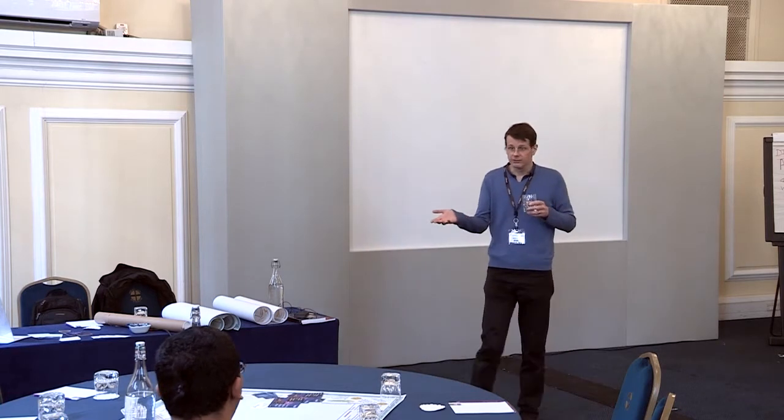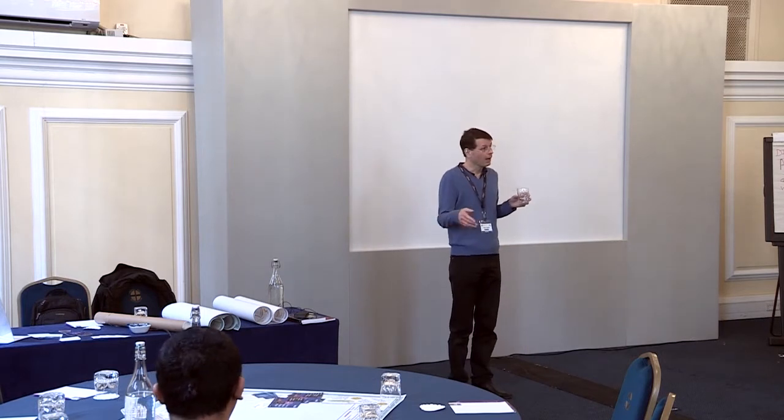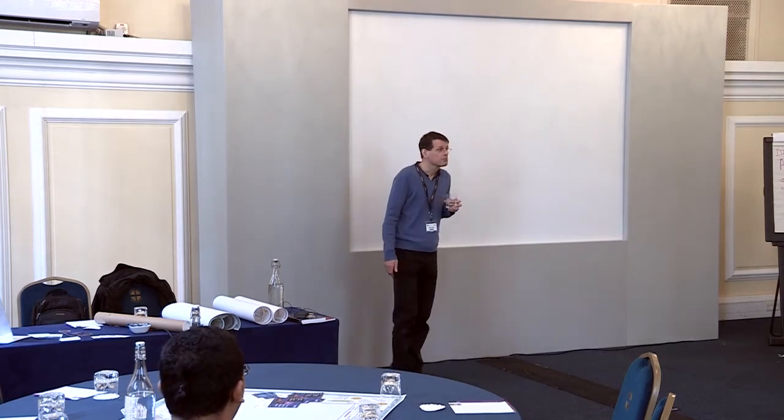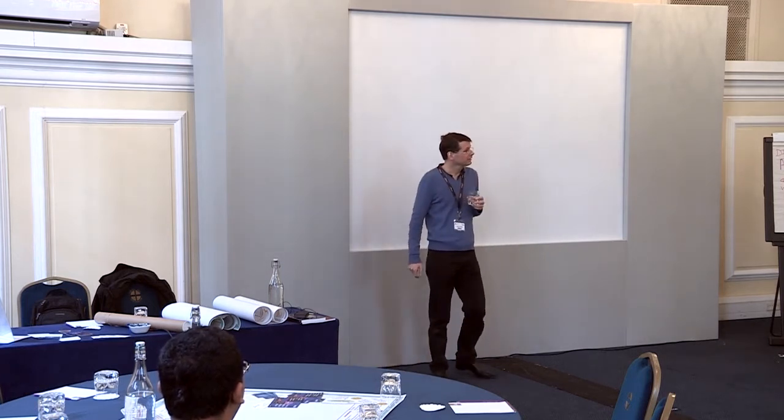What we're going to do here is simulate a retrospective using these sheets, give you some experience of doing it, and then we'll debrief and talk about it. These are facilitator-less retrospectives. You don't need a facilitator for this. Some Scrum Master types like to hold back and observe as a kind of facilitator, but frankly, there's very little for them to do. If you've got a larger team, sometimes the teams will split into 2 or 3 and do a sheet independently, and then there might be a role for bringing them back together. But largely, these are self-organising retrospectives.